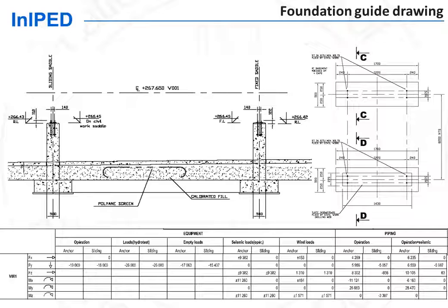The civil engineer of the EPC contractor does not always perform the design of foundations. Indeed, the design of foundation has to be, by law, compliant with the local code where the plant is being installed. And the EPC contractor civil engineer is not always familiar with this code.